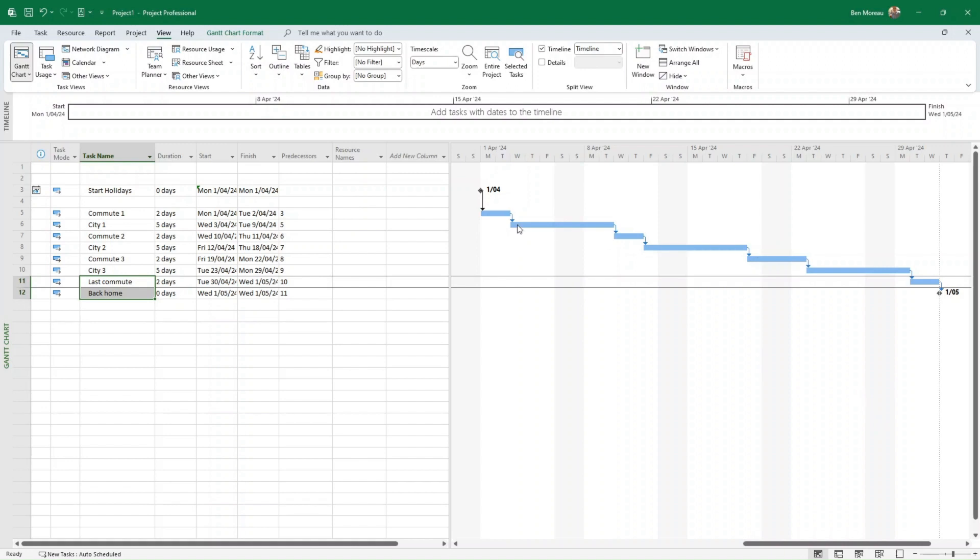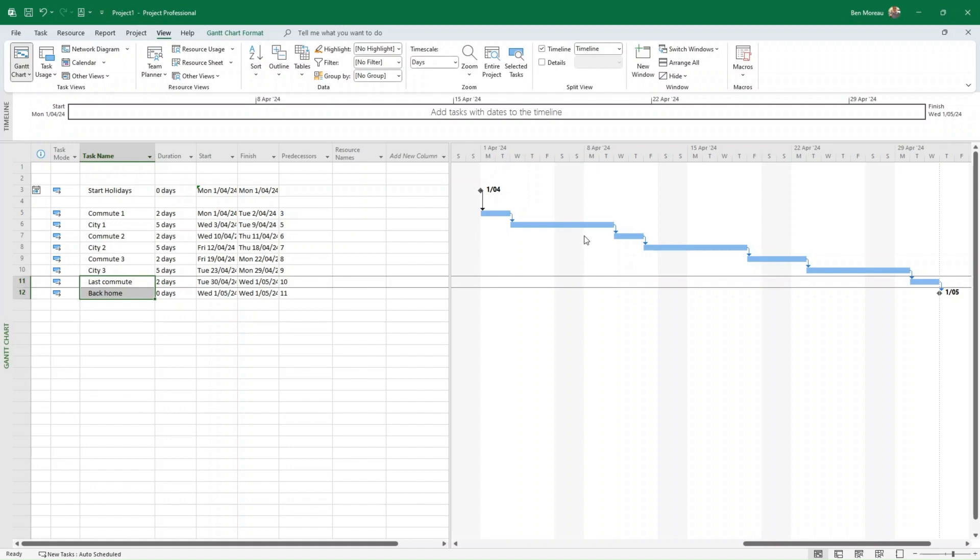So you could have looked on a piece of paper, but it is doing all the calculation by itself. So here, obviously, in this MS Project very simple example, it assumes that there is no work on the weekend. So something that takes five days in here, it would take seven days because it would skip the weekend. But there are some options in MS Project where you can obviously skip this.